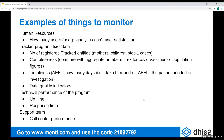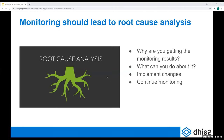You can also monitor your support team. For example, if you have a call center to support users, you could check the call center performance: how many phone calls are they able to pick up on time, how satisfied are people with their performance? When you are monitoring whatever you choose to monitor, it should lead to a root cause analysis — not just seeing the results, but asking why you're getting them, what you can do about it, and then implementing changes and continuing to monitor. It's better to monitor fewer things and focus on doing something about the results than to monitor 500 things using all your project resources, leaving no one time to fix the issues.